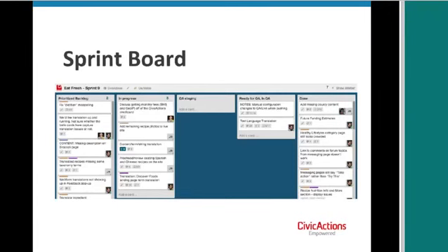People have also experimented with starting on a Wednesday and ending on a Tuesday 2 weeks later. But the idea is that the next day, that Monday after or that Wednesday after, you're starting with a sprint planning meeting again. You're grabbing the stories, doing the planning, getting to work. And so you just have this regular cadence of every 2 weeks kicking out shippable product.